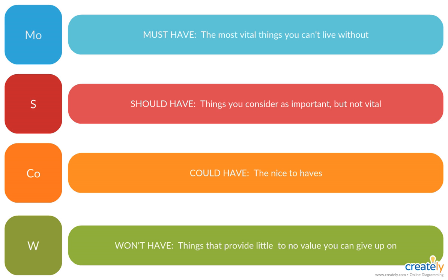Well, sometimes to try and give people an understanding of why we've got these priority levels, and then why we need to order those, this is something that's pretty well known in agile project circles. It's a house in a tropical rainforest, and it's predicated on the idea that there are many things you could think of that would be must-have for a construction project. Walls, roof, floors, all those things. And there could even be should-haves, meaning maybe the decision between silver and gold-plated plumbing hardware, or 10-year and 15-year shingles. Those things represent what we call the backlog, and they're really great guides in figuring out what you really need to get finished to give the most value to a customer at a predictable cost and duration of a project.